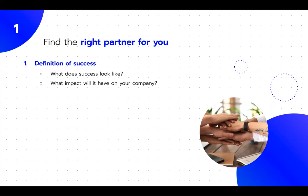is the sort of expertise that you have in-house. So it's really important to assign someone on your team to manage the outsourcing team, someone who's actually going to be able to spend time collaborating with them. And this is going to help avoid delays when the outsourcing team needs information or access, but it's also going to help keep everyone aligned on the project goals and priorities. So we found that with IT teams it can also work really well to have someone technical on the client side. So ideally a CTO or maybe a senior developer, someone who really understands the business side and the technical side. Now we're shooting ourselves in the foot a little bit here, but I would definitely consider setting aside some of your outsourcing budget to make sure that you have the right kind of expertise in-house.